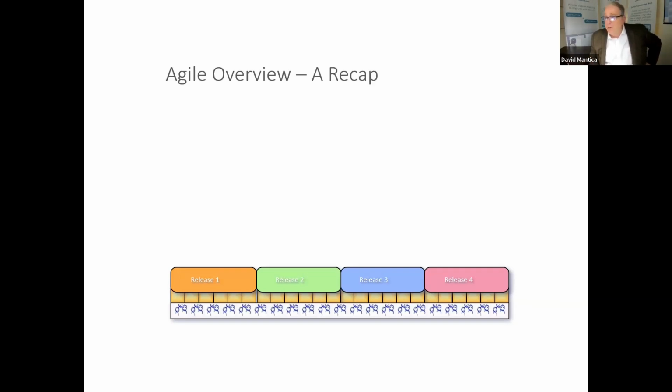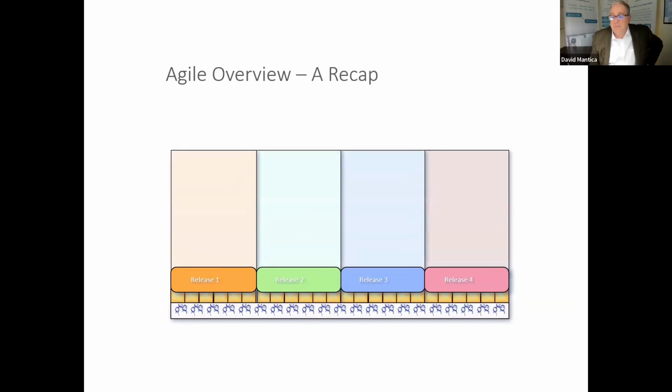And then the one above that, those are your iterations, 2 to 4 week iterations. Multiple iterations become releases. But remember, at the end of an iteration, you're going to showcase something. A release is where you deliver it out into the wild. But at the end of each iteration, you're going to show people a sliver of some level of functionality, so they can provide you feedback and input.